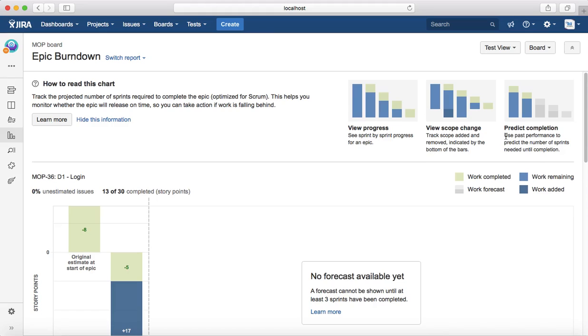The third very good feature available in Epic Burndown is the predict completion. Based on the past performance of that particular epic and how the epic has been progressing in the past sprints, it will give you the completion prediction.